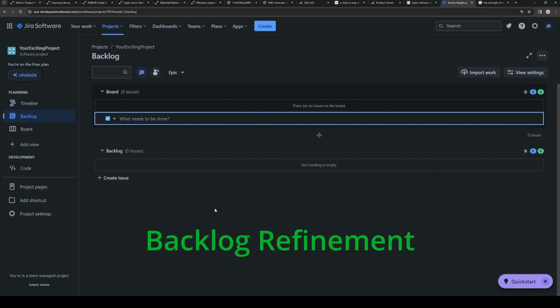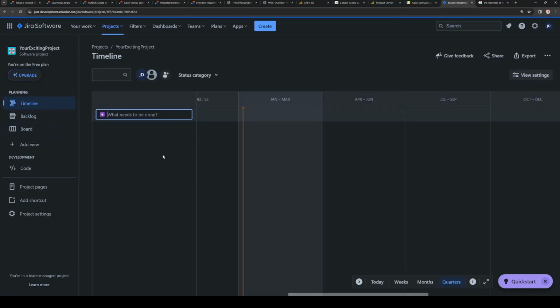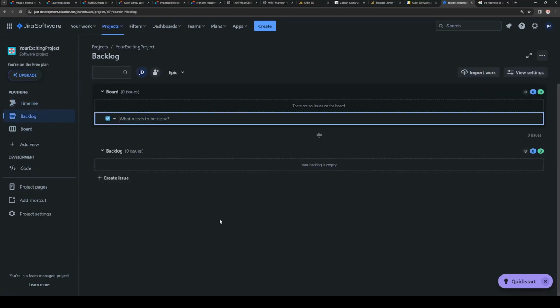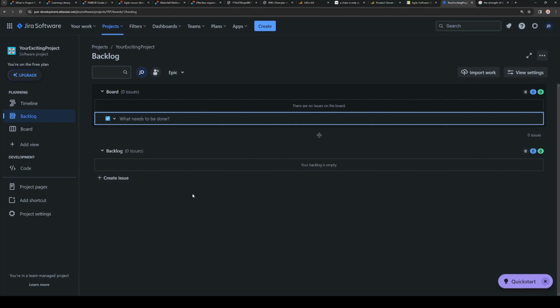And then quite often the product owner together with the Scrum Master and the development team perform backlog refinement. They go through the stories in the backlog, checking together with the timeline the priority, and if a story needs to be merged with another in case of duplication, then they merge it, or they delete it, or they reject it. If you as a developer find a problem that should be fixed soon, but there is no story for it, just create it and put it on the backlog. And we will work on the planning a little bit later, of course.